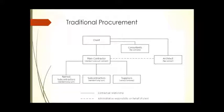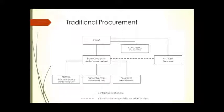The instruction starts with the client, but it goes to the architect first. The architect checks whether it is viable and technically possible, then issues the instruction to the contractor if satisfied. The architect must also advise the client of the consequences, because the client may not be knowledgeable enough. That's why we have a safety net through the architect, whom we call the superintendent in most projects. These are the basics you need to know.